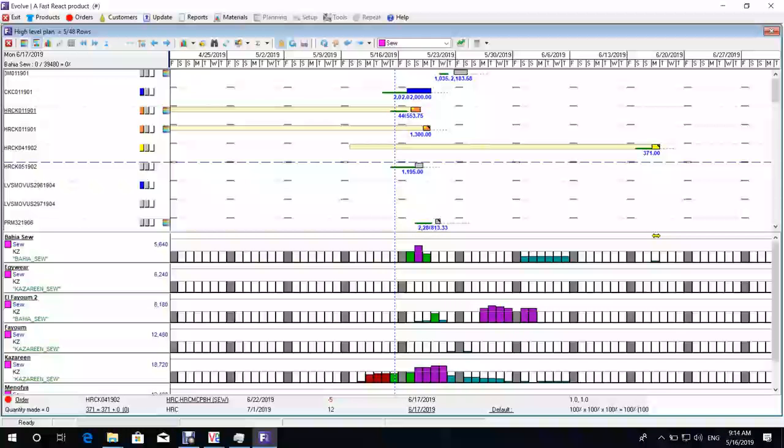Okay? So it's saying that roughly we should be starting our time and action, well in the past actually, we should have started our first actions by the end of the 10th of May. That's when we should have completed our very first initial event, so maybe first samples or PO approval, whatever that may be. Then all this time here, roughly about a month, is our total time and action. And then this little bit here is just our production time, along with any post-production, i.e. your sewing, your cutting, your ironing, and if it requires some printing and embroidery, it all represents in this long strip. So initially the time taken to complete this order is maybe 2 months from the point when we initially received the inquiry from the customer all the way to the delivery. It's going to take us from the 10th of May to the 20th of June. So just shy of 2 months. Okay?